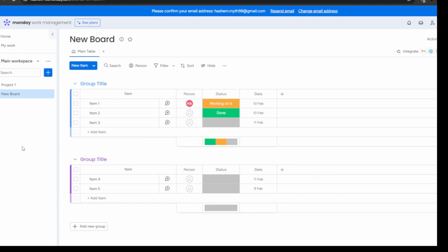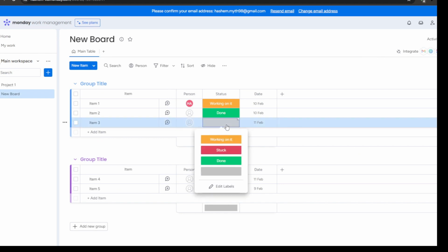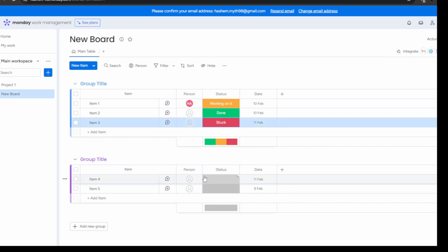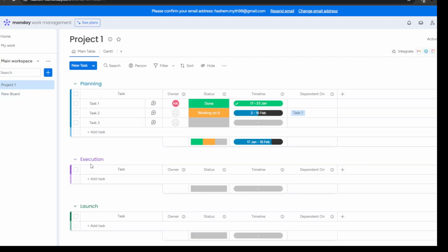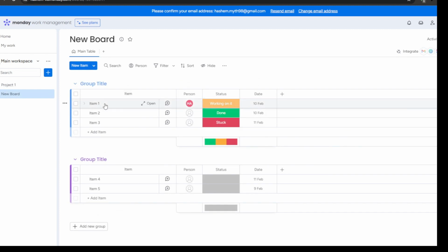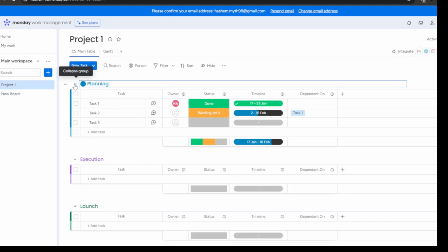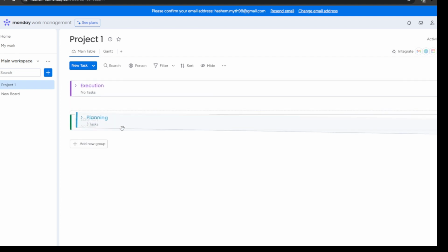The interface is really intuitive with all the color coding, graphs, and icons that allow you to visualize status and progress at a glance. I'm going to set up groups for the 3 high-level buckets of work that we need to tackle first. And this can be really anything that you want it to be. So for example, planning opening festivities, hiring staff, and prepping the actual store location if that's the kind of project that you're going for. And don't stress out on these too much because we can always rearrange these later by dragging and dropping.